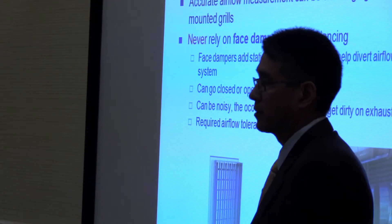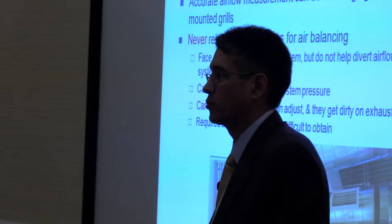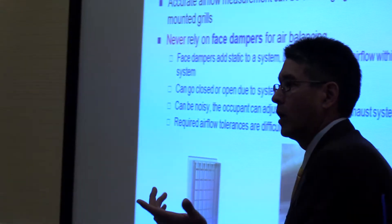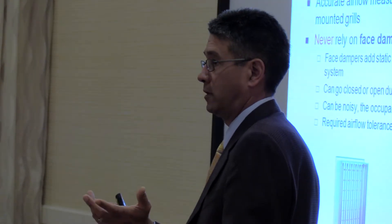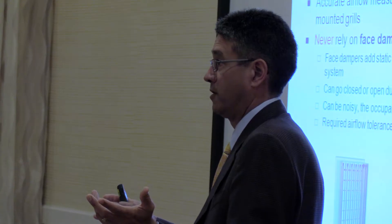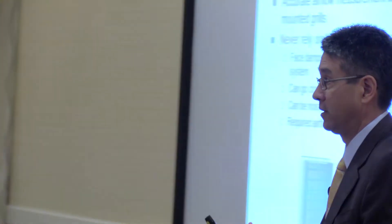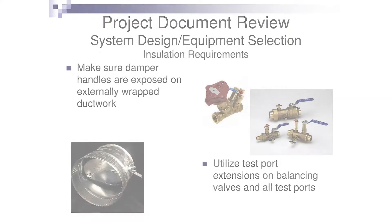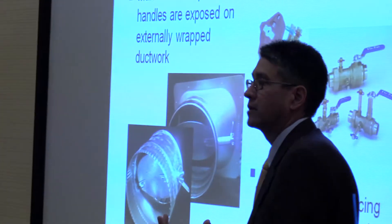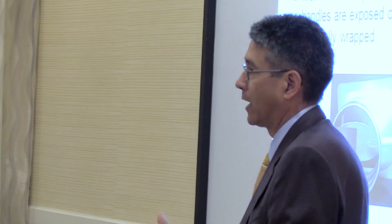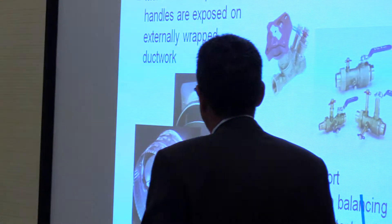Face dampers can be noisy, they go open and closed, and get very dirty on exhaust systems. Anytime you can caution on face dampers when looking at a job, look at different options. On automatic flow control devices for airflow — a contractor who put them in said preliminary testing showed it wasn't even close. Also, when you have dampers and balancing valves installed, make sure the insulation spec and the insulator are all on board, and that all extension ports are provided to get the handle outside the insulation — extension ports are a very big benefit on a job.